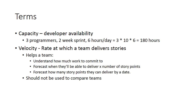Velocity is the rate at which the team delivers stories. For example, a team that delivers 35 story points per sprint on average may be said to have a velocity of 35 story points.